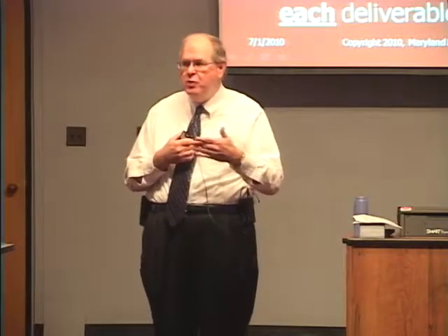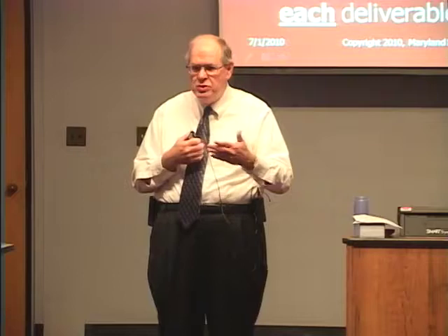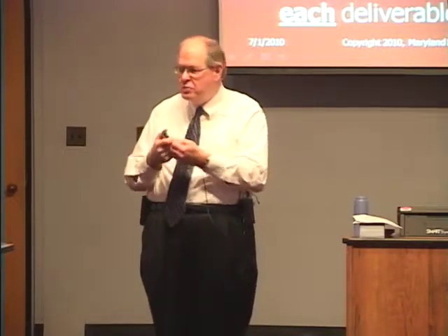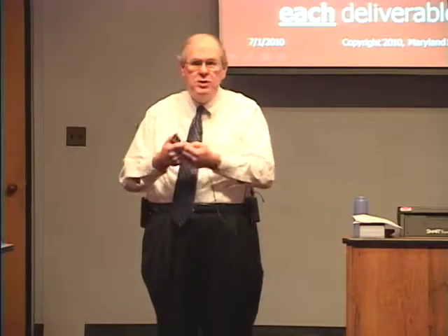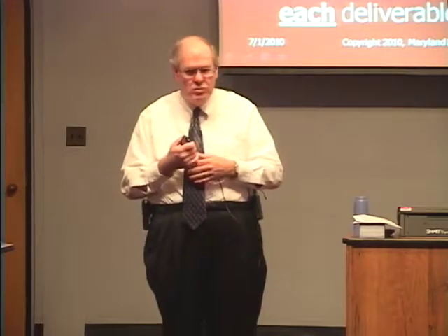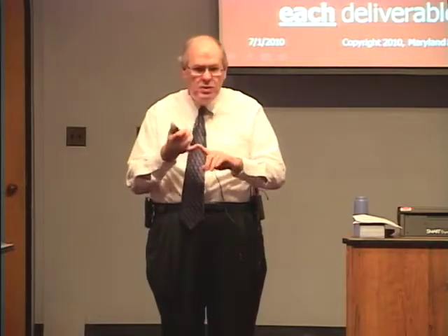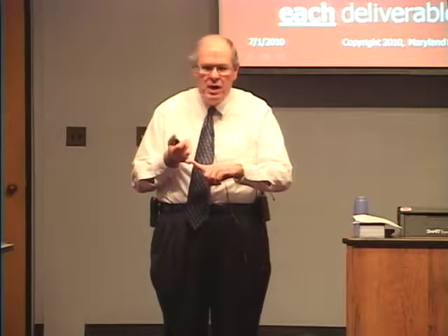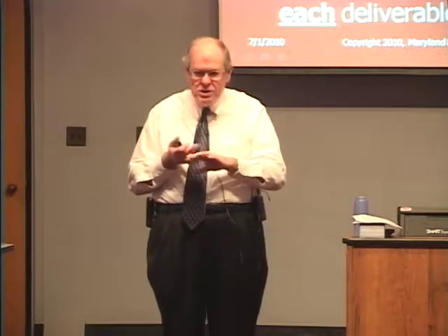Obviously that's a very bad result if you're trying to do a checklist to determine what the deliverables are, and you cannot tell from your specifications what the deliverables even are. That means you have to re-examine and rewrite so that you can tell what your deliverables are.